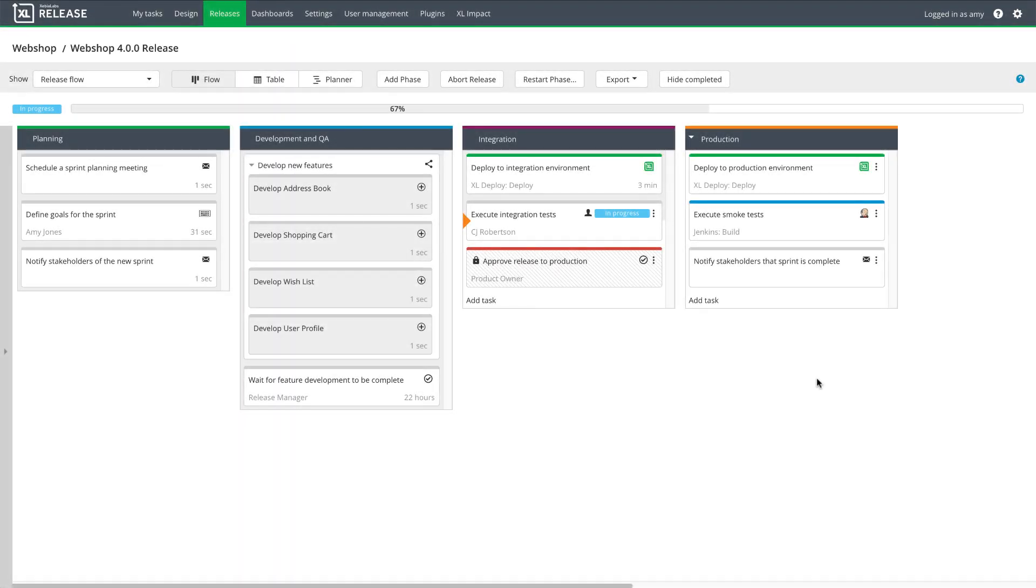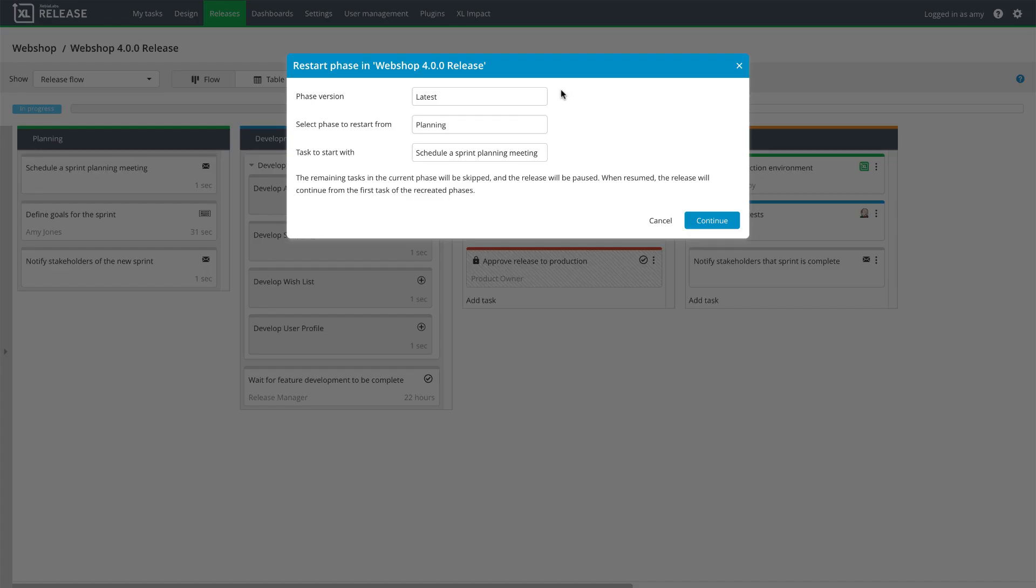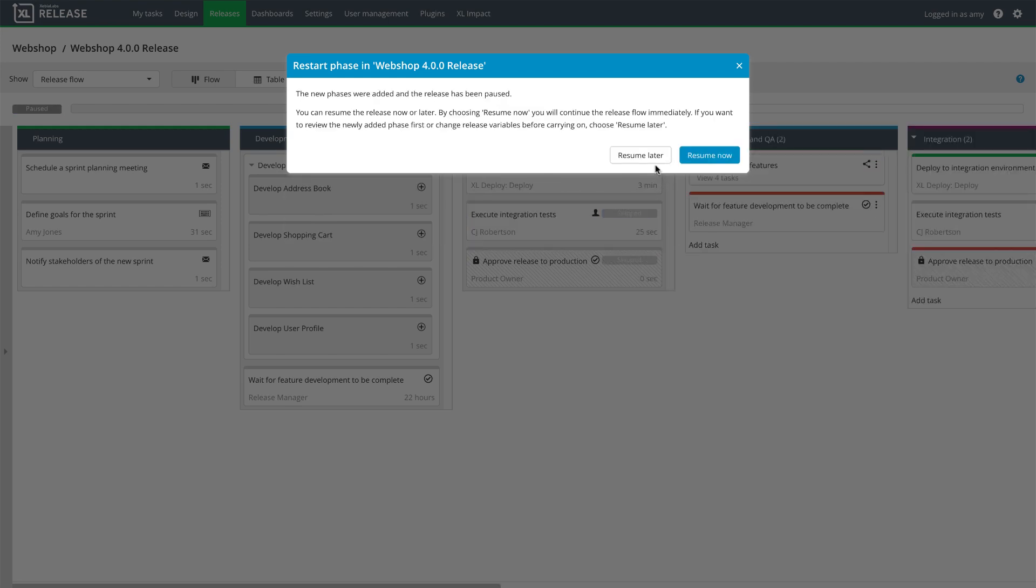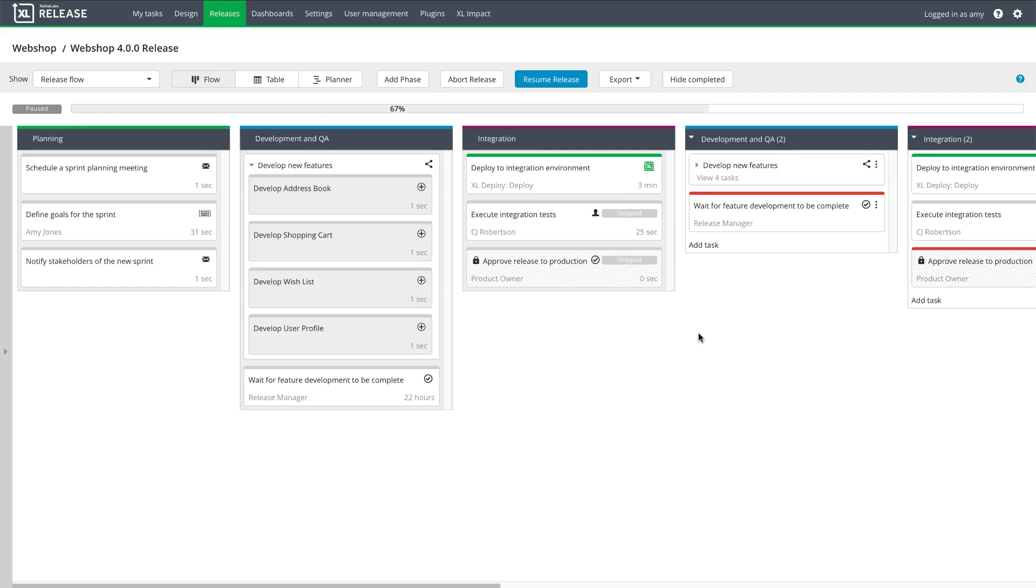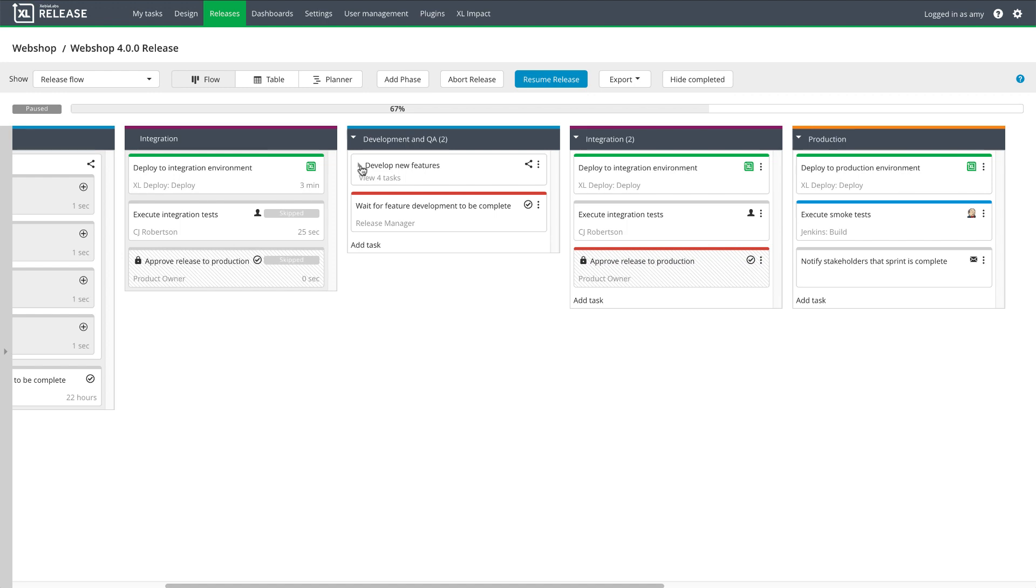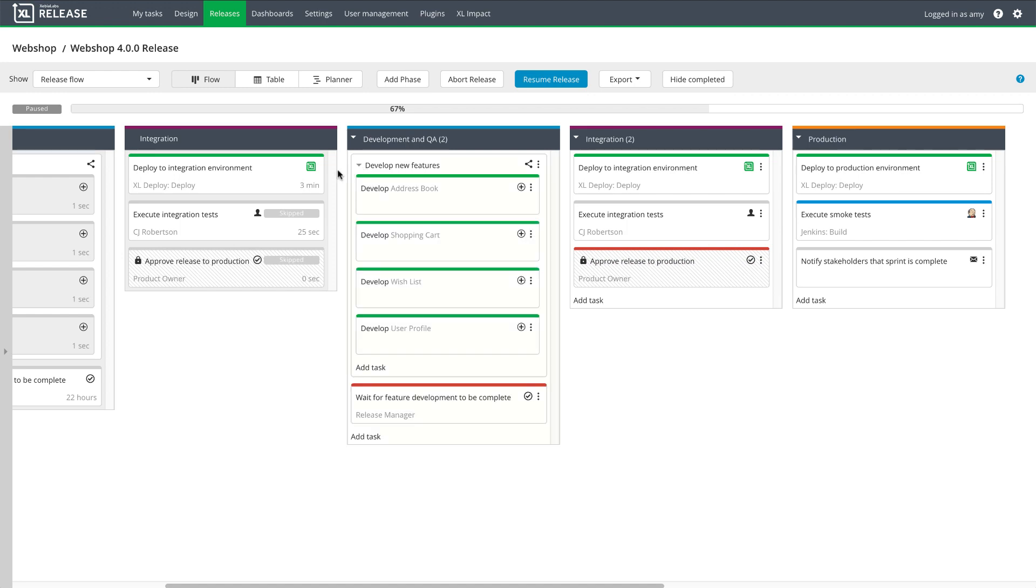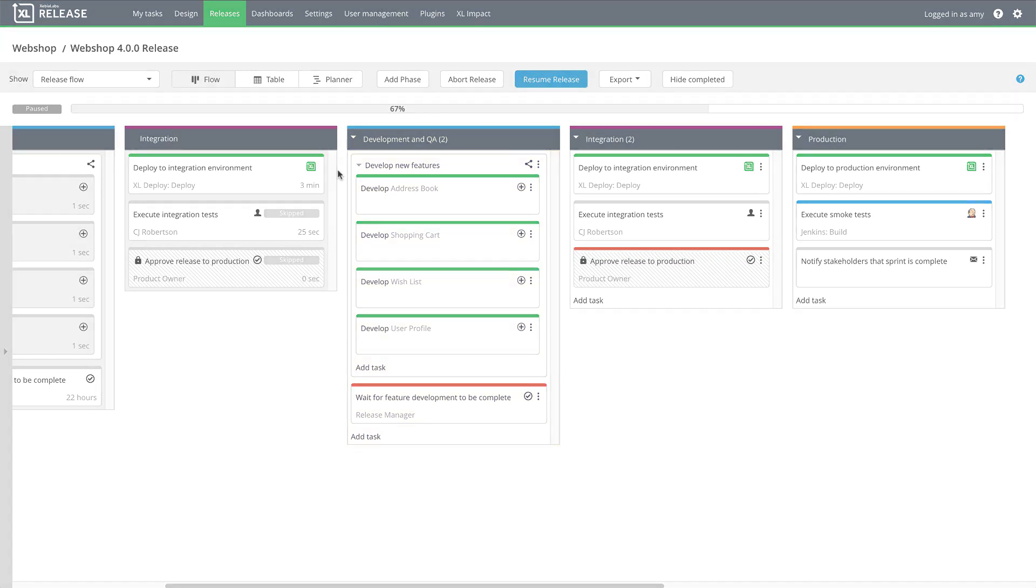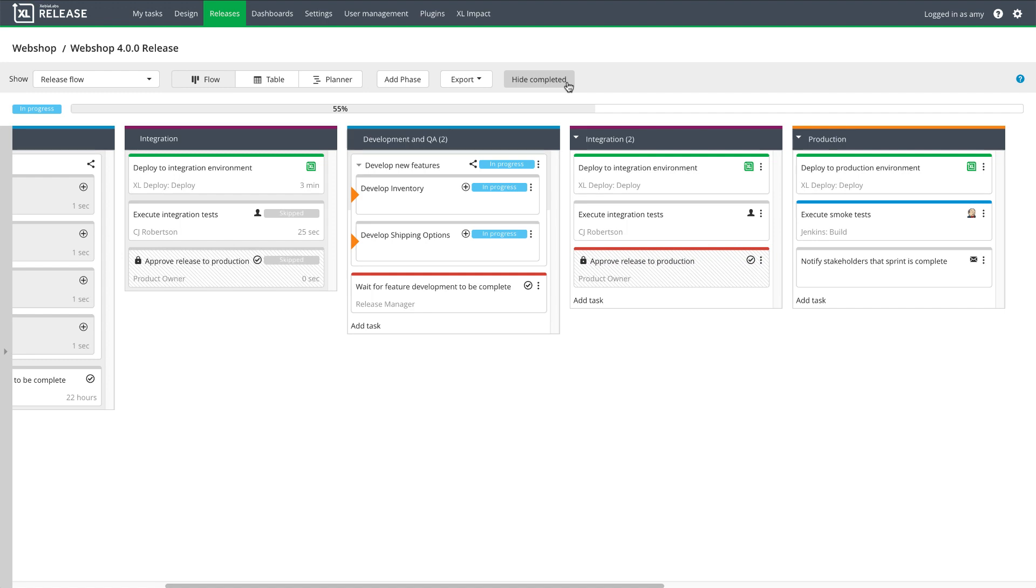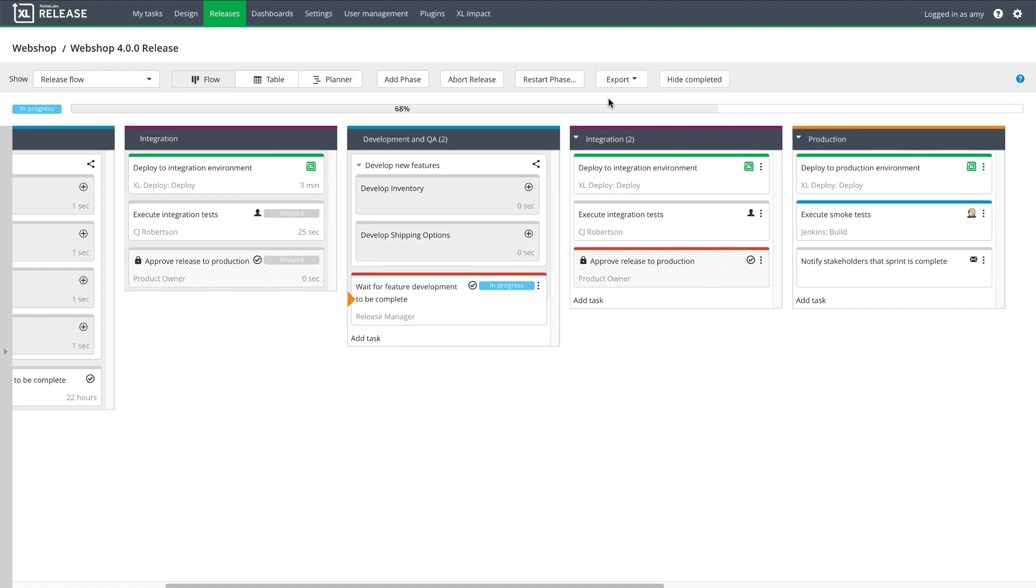At this point, the team is notified that two additional features need to be added to the release. I'll account for that by restarting the development and QA phase. I'll select the location where I want to start, and choose to resume later. Here's the new phase, development and QA 2. I need to change this phase so that it starts sub-releases for the two new features. Now I'm ready to resume the master release. It creates the sub-releases, and they start running in the background.